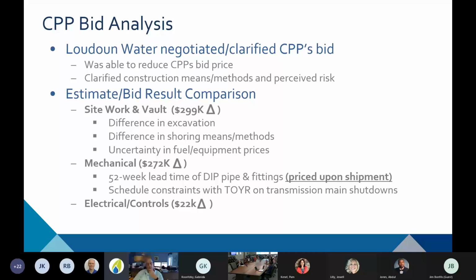Then we're heading into the time of year when they can install the pipe, but they have until the end of March to do that, which is also when we have winter weather that can cause delays as well. So there's a narrow window for when they can actually make these connections, and that was driving some of the risk and the pricing related to their bid.